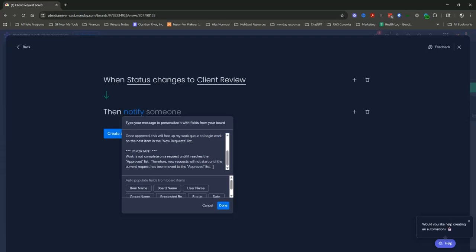Don't start new items until the previous item is done and satisfied and approved by the client. That just keeps everything clean, keeps you from running around chasing 10 different threads of work. Begin a task, work a task, finish a task, move on to the next task.